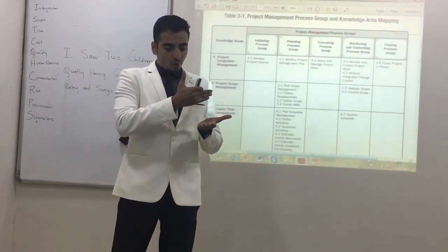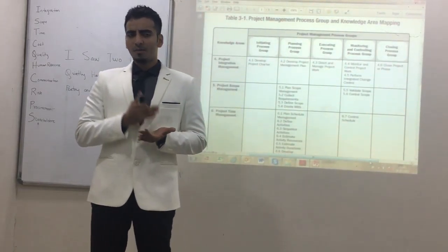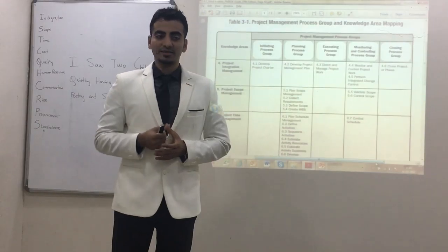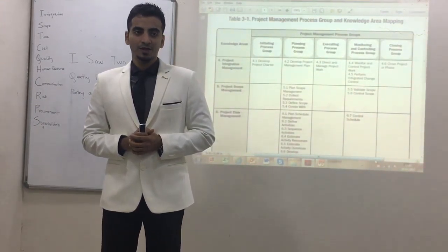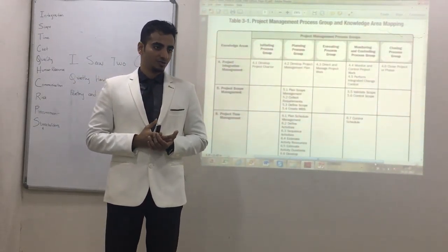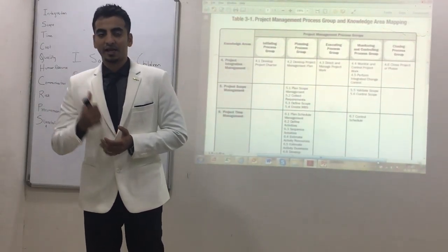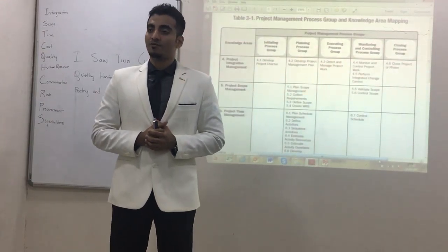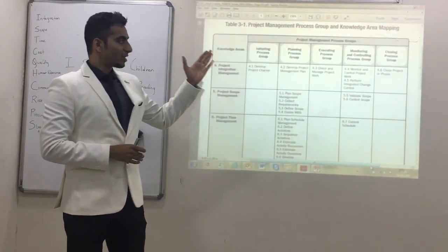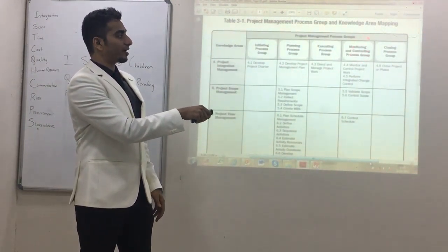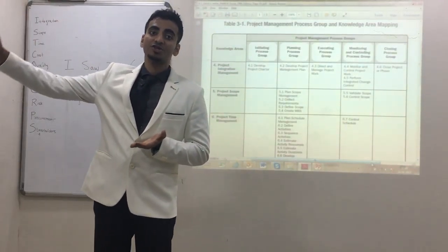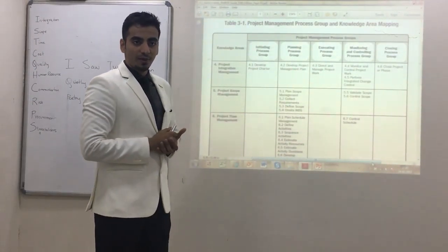Monitoring and control. This is a point which is nothing but a milestone, a point where I'm going to cross-check whether everything is right as per my plan or not. We have taken an example of Bank of America. We are creating a banking portal for them. In a 12 months project, a 1 year project, we are going to have 4 different milestones. The first milestone will come after 3 months, the second after 6 months, the third after 9 months, and the fourth after 12 months, which is the success of the project. At the first milestone, after 3 months, I will have monitoring and control, where I am going to cross-check whether everything has gone smoothly as per my initial plan, which means as per my project management plan, right?